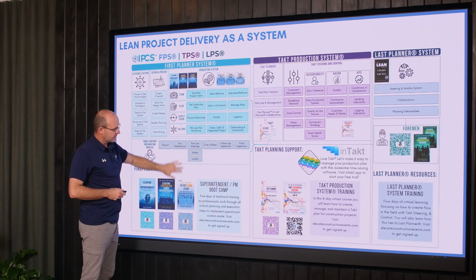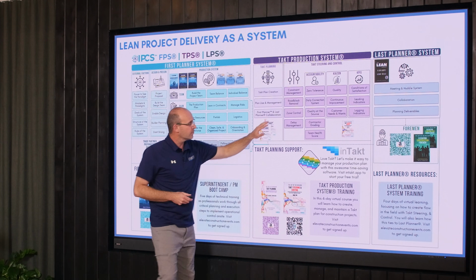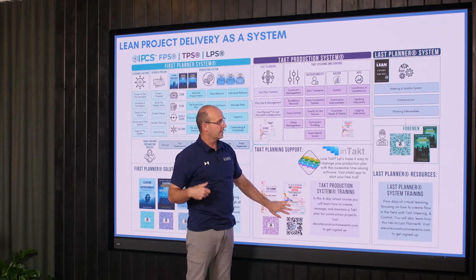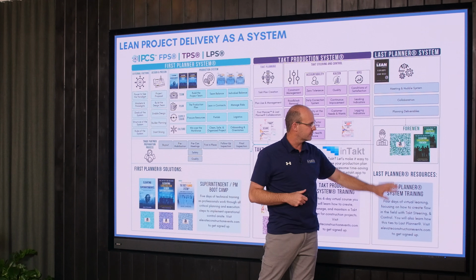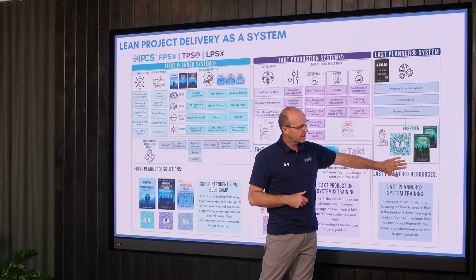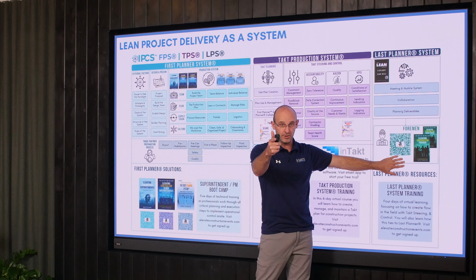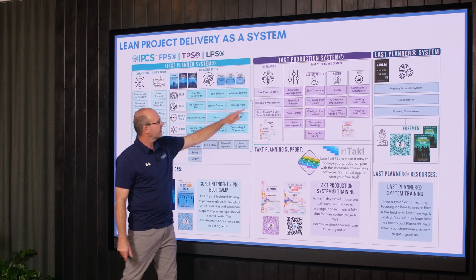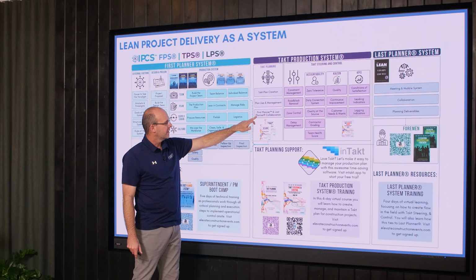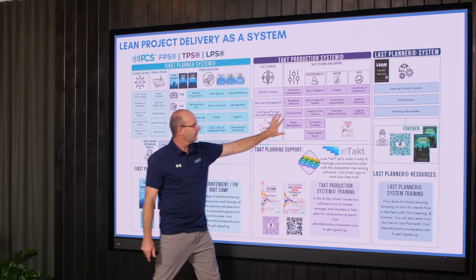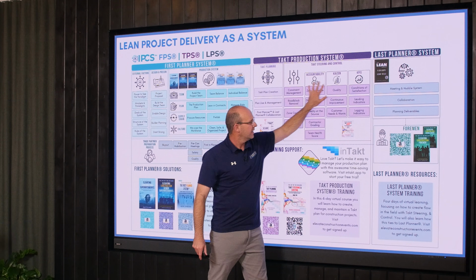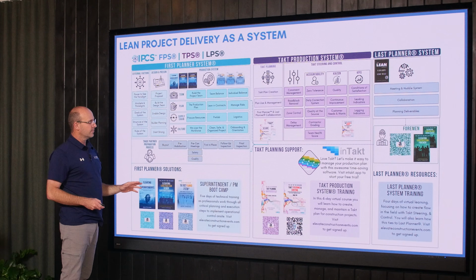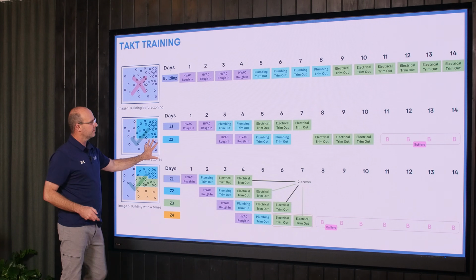We plan the project, which we've talked about, but on a rhythm where we can see those things that I was showing you in the last slide with the trade partners. So by the time it comes down to do look-ahead planning, weekly work planning, and day planning with you, we already have a good sequence here. We already have a takt plan that we're using that ties into these other systems where we can do all of the key components that are required for flow. That's why we teach it this way, is because these concepts come into play in the middle.